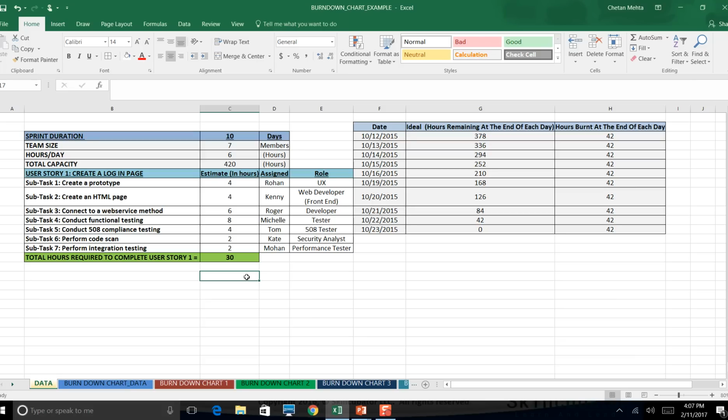Now as I said, you can always keep some buffer of 15 to 20% to play safe. So instead of 14, you can say, we can take like 12 stories or 10 stories, so that you are more confident in finishing the work.